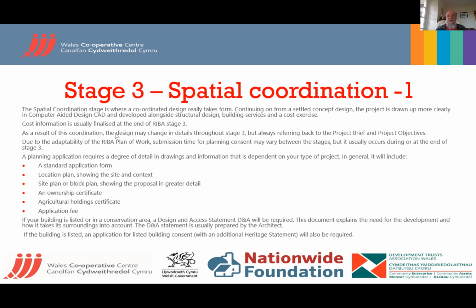I'll just let Casey in. Dave, can I ask about the ownership certificate? Can that be, if you've entered an agreement with a landowner and you're trying to get planning permission, but you don't yet own it? Yeah. On the land ownership, you either say that you own it or that you have informed the owner that you make a planning application on their behalf.